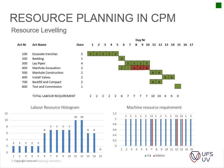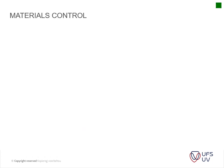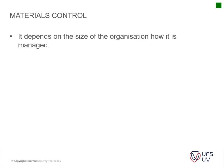The simple solution is you just level out your resources and your TLBs. What it causes is it causes your project to extend — the pipe laying moves out one day together with your excavations, which moves the project out one day. If you level your laborers to eight, the resource conflict is resolved. That's just a brief recap of how histograms work. Moving further into materials control, that is on page 401.